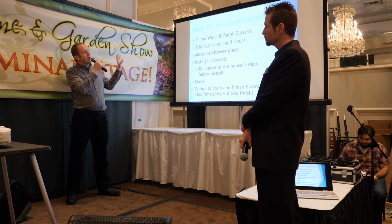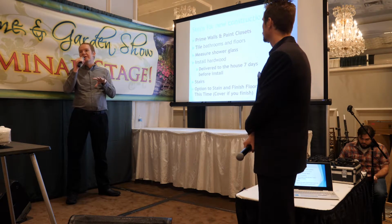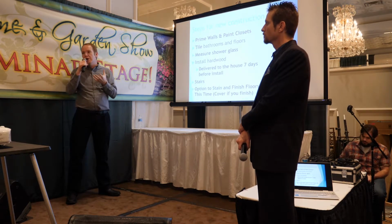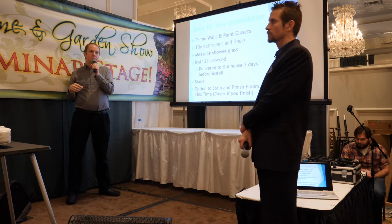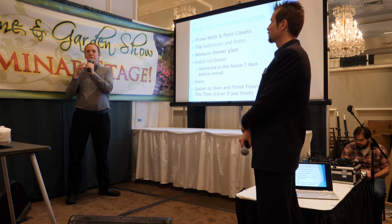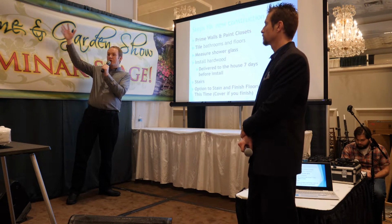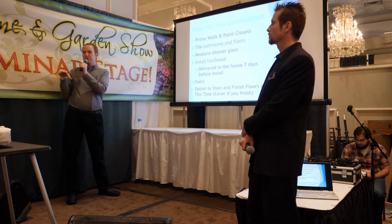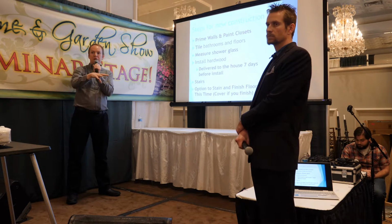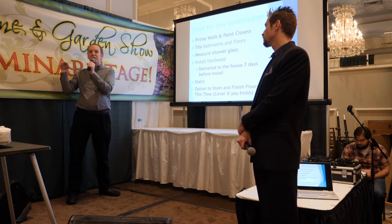And then, while that is happening, we bring in our hardwood floors and get them delivered. If you're doing pre-finished or unfinished, we bring them in at that time because you want the hardwood floors to acclimate to the wood that's in the house and to the environment of the house. That way you don't have a lot of issues of buckling and shrinking and all that stuff. So you also want to make sure that if it's the middle of summer and it's 95 degrees outside and 100% humidity, you have your AC going in the house and have it at about 72, like it would be as if you were living in the house. That way there's not that much of a change, and the same in the winter. So you want it to acclimate as much as possible.